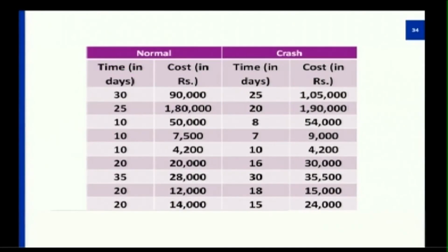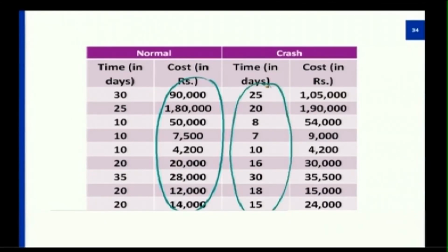As a next stage, we will be considering the normal time. What would be the normal time that every project costs? And suppose the customer asks me to crash the entire activity into a list of timings given, so that means A can be crashed by 5 weeks, B can be crashed by 5 weeks, C can be done in 2 weeks, and D in 3 weeks.